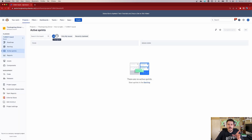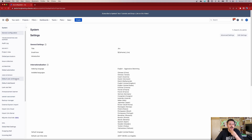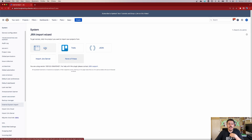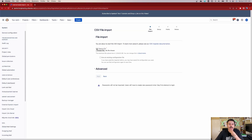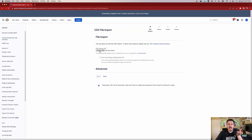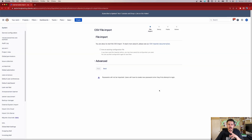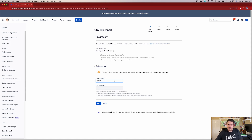In order to get to that screen, rather than hitting the Create button, we're going to swing over to the gear icon and go to System. Once we're in System, on the left-hand side, we're going to look for External System Import. From there, we're going to select CSV. Now we're going to pick our file — click Choose File and find the file we just created. Once you've selected your file, click Open. You don't have to worry about the delimiter settings because this is usually already set up correctly as long as you saved it as a CSV UTF-8 comma-delimited file. Click Next.